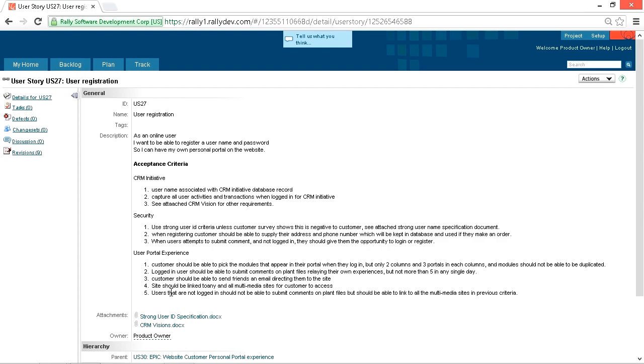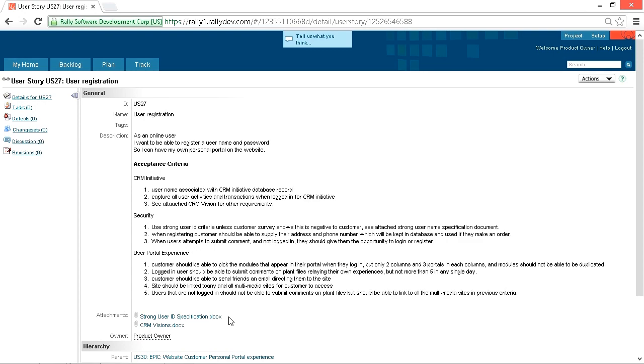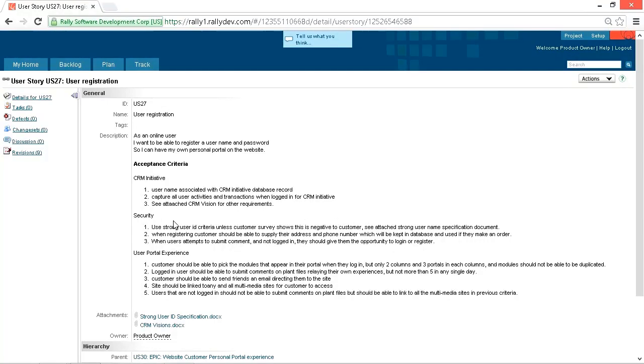We also have some attached documentation, which is another flag that this might be way too big. We have the strong user ID specification doc. That might be something that the company has on saying how to do a strong user ID. But you can see here the first initiative is use strong user ID criteria unless customer survey shows this is negative to the customer. So that isn't even really relevant unless we know we want to use it, and we don't know that until the survey is over.